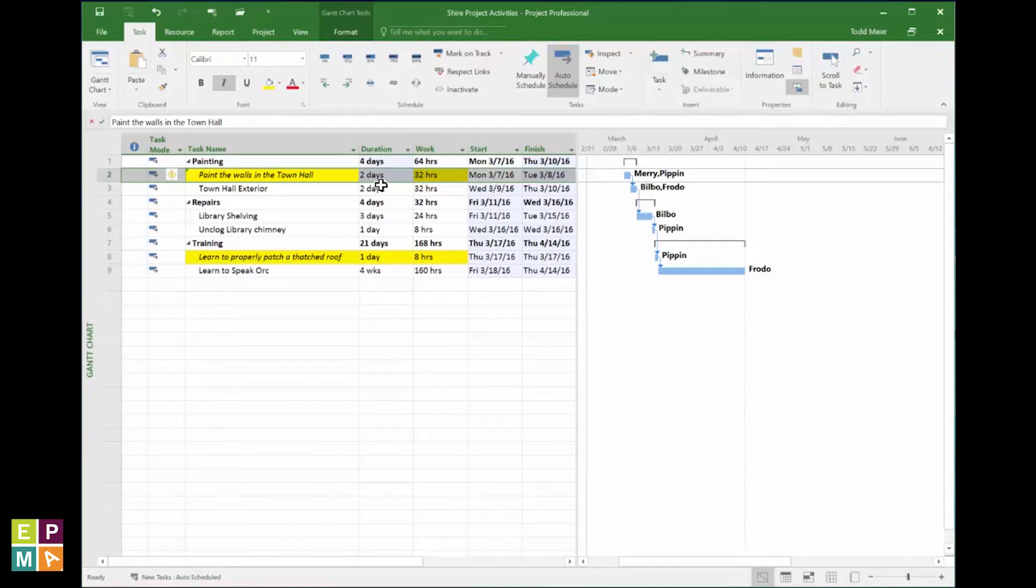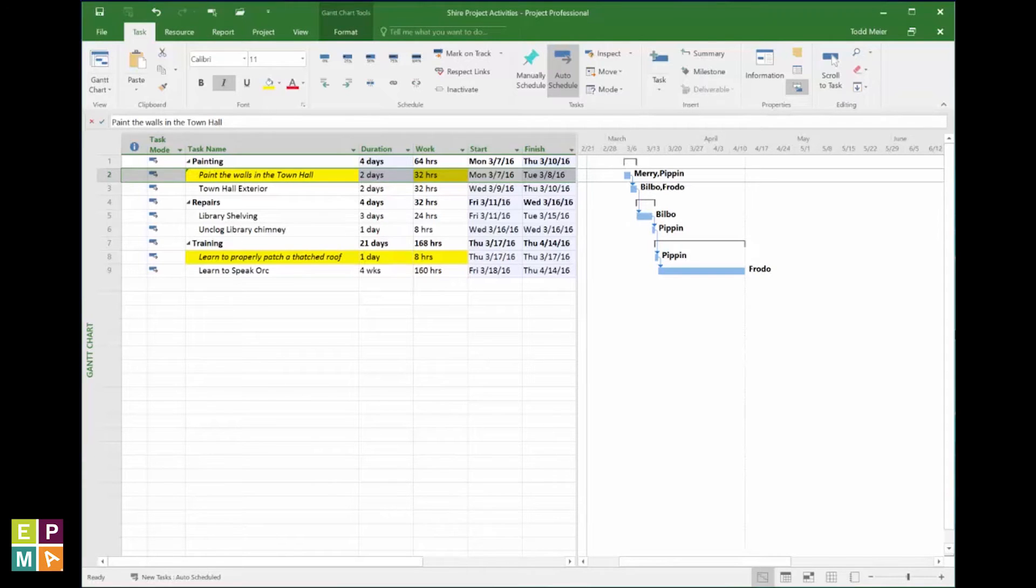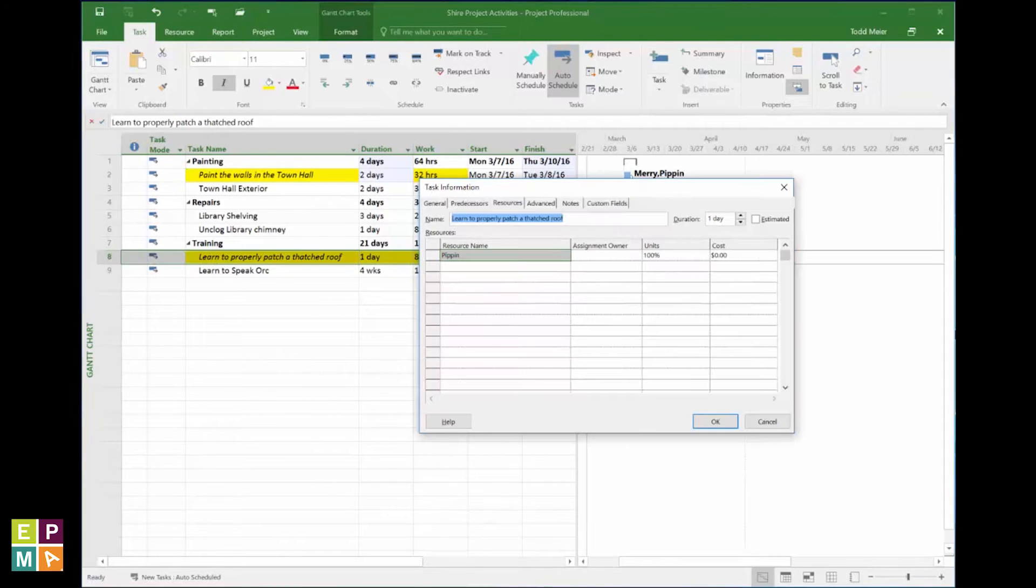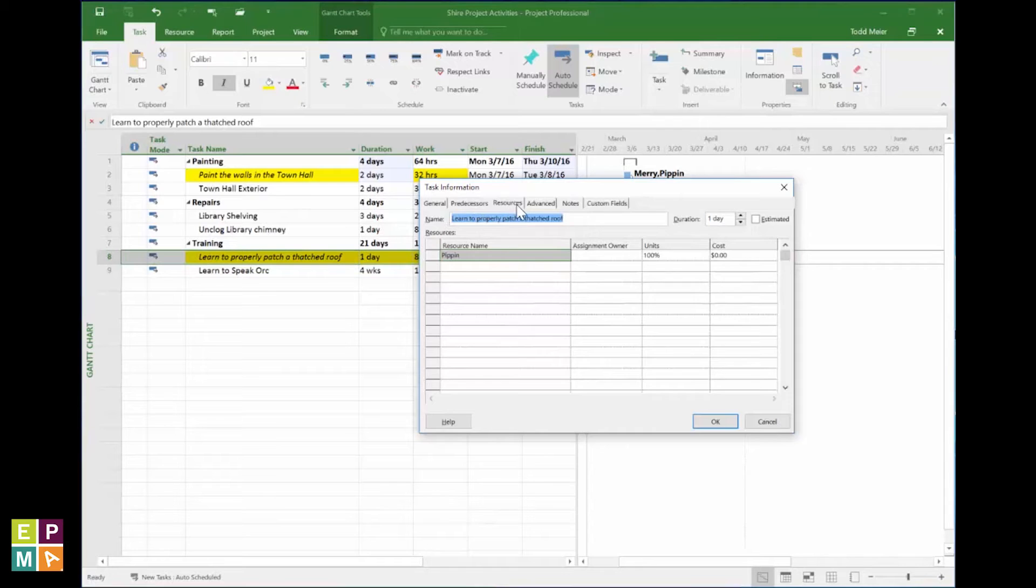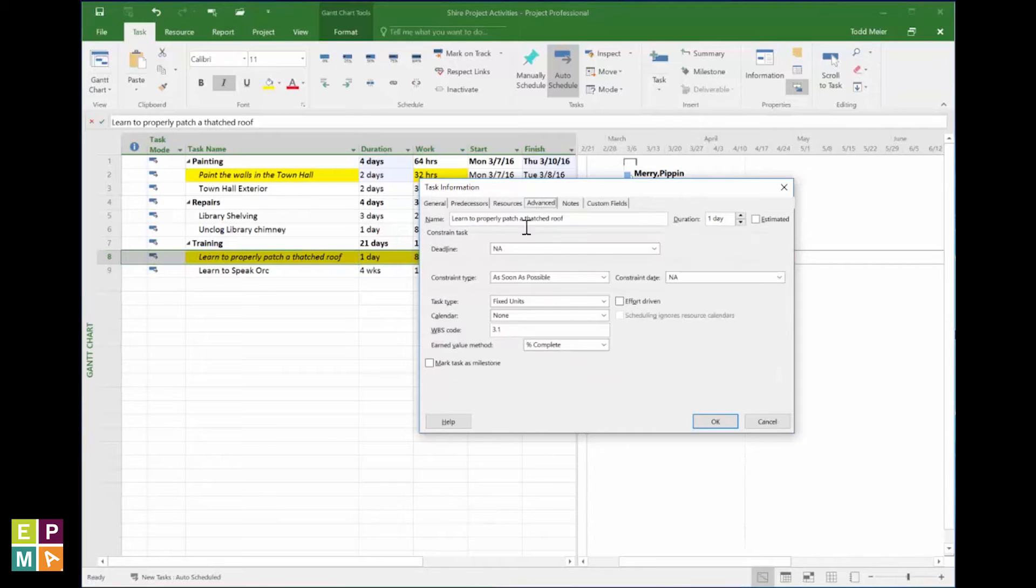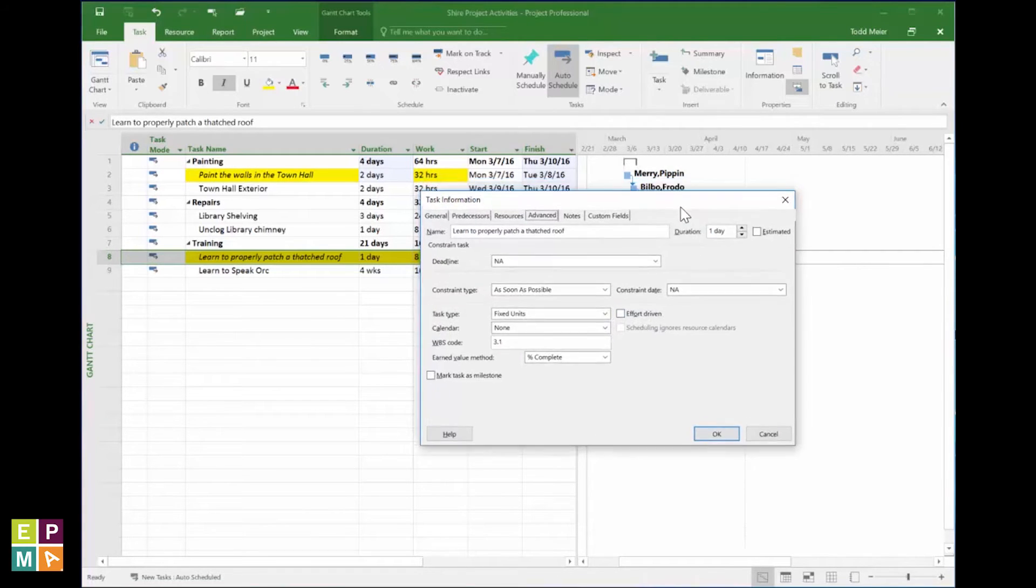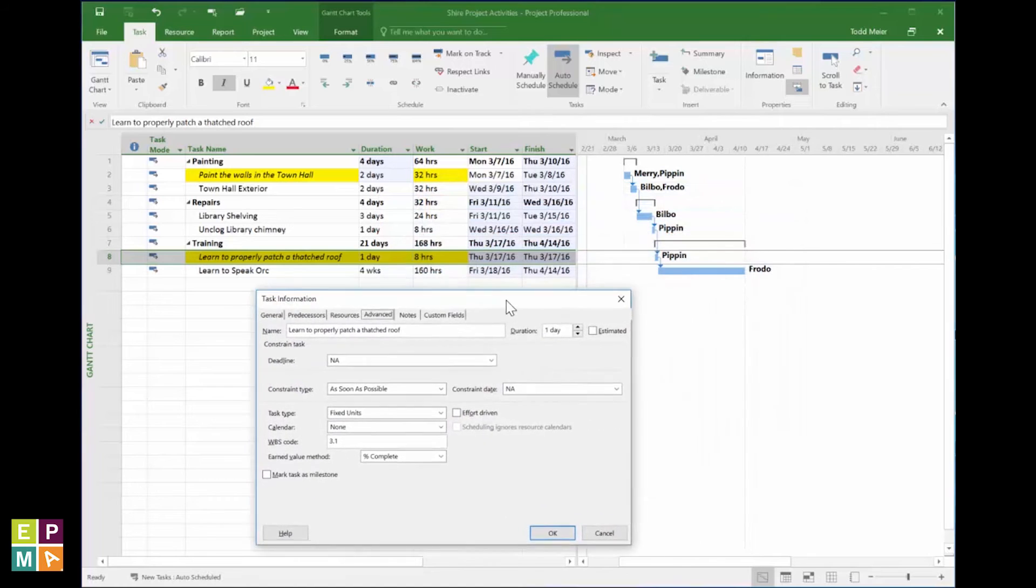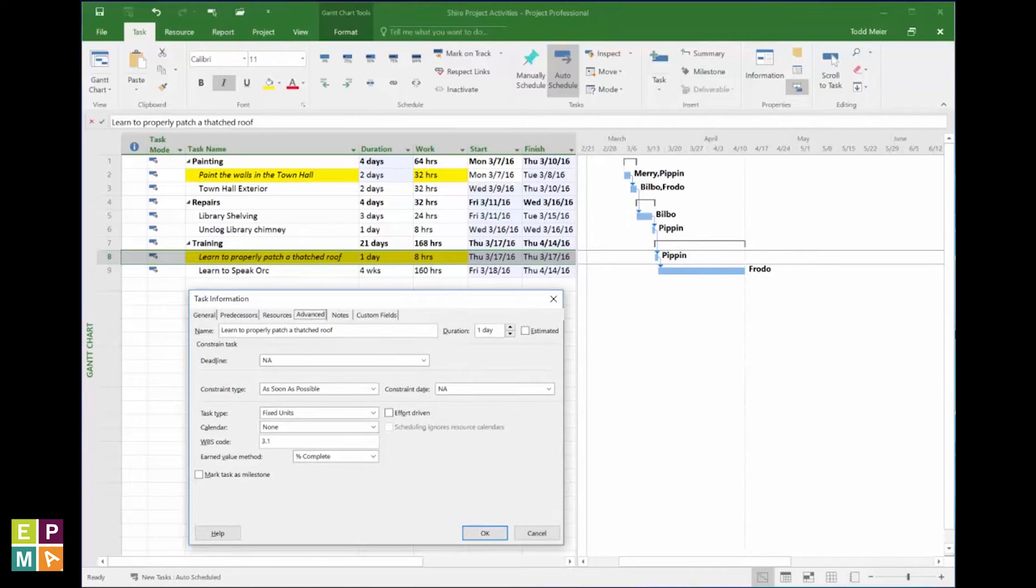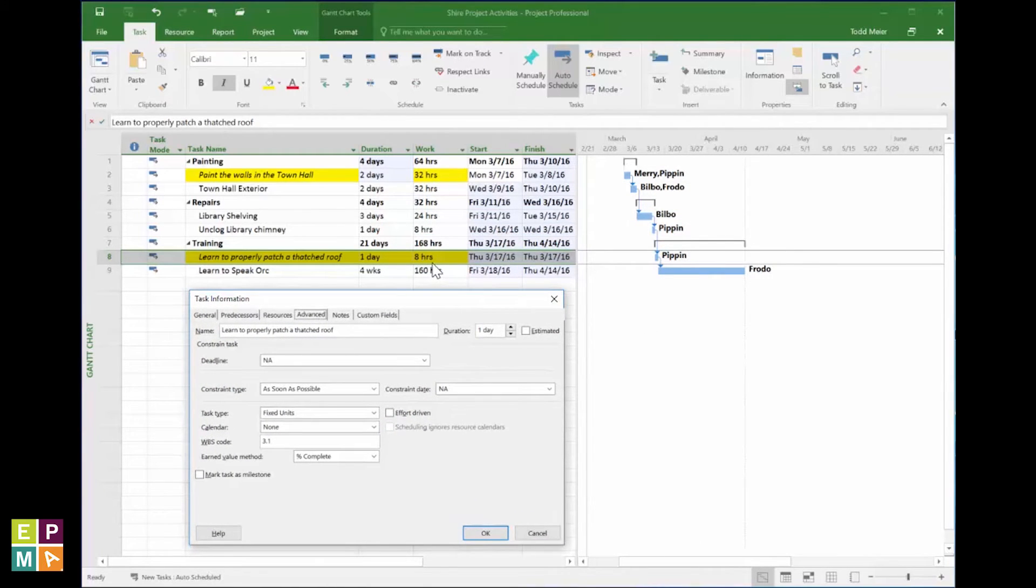Subsequently, double-tapping my wand on the second task reveals that it does not have the effort-driven spell cast upon it. As you are likely to infer, without this spell, adding another Hobbit to a task will not reduce the task work, but will instead actually compound the amount of labor associated to the task.